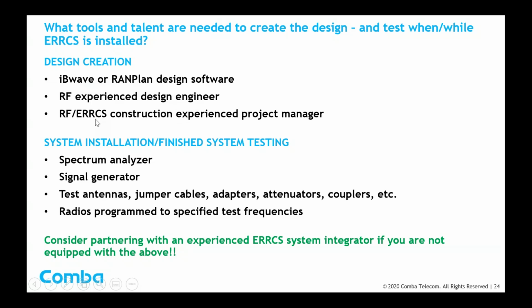And you need to have an RF experienced, ERRCS experienced, construction experienced project manager. Again, he should have a reasonable amount of RF experience so that when he's doing his site walk and communicating back with the designer, the two of them can speak the same language and he can relate back what he's found so that they can work together and modify the plan to make sure it's going to be constructible and ultimately that it'll work right when it's done.